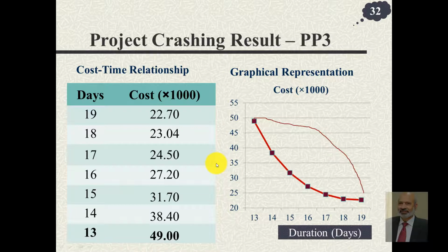Reason being, after calculating these, you go back to your finances, your superiors, and you say that we can perform this in 19 days with this cost, and we can squeeze it to 13 days, but the cost would be this. And at this time they would tell you what their budget is. They may say that we have something like $35,000.